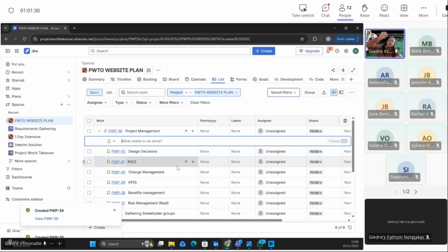But usually we just create a log, and we say, this was the decision that was needed. When did you raise it? What was the outcome of the decision? And what I also like to say is, where was the decision made? And do you have any evidence for it? Of course, for a project like this, it's not too crazy because I'm involved, so I'm sure I'm aware of every decision that's made.